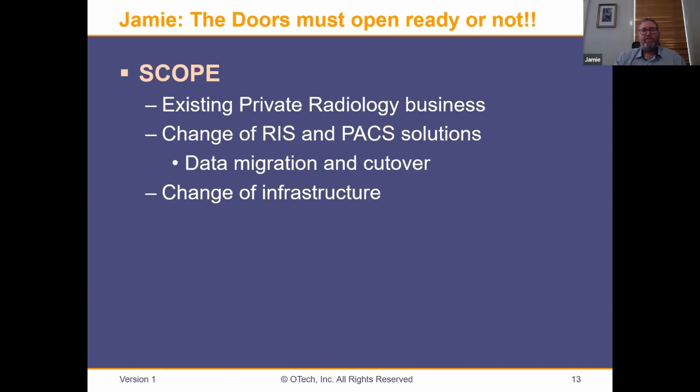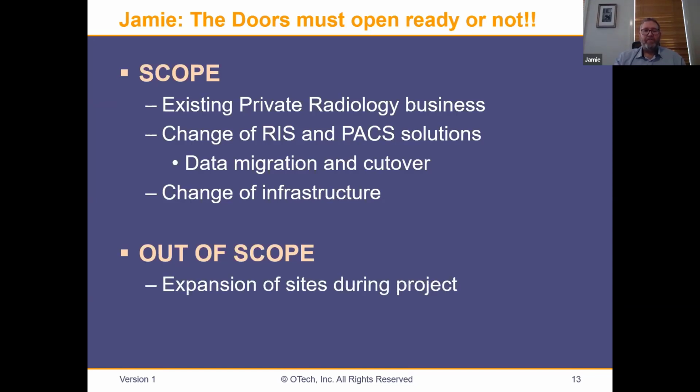When we look at how this scope is, the one thing that came out during the implementation phase, in fact, during the initial implementation planning study, was out of scope work. In particular, the expansion of sites during the project, moving from a single site to a 3-site private practice. Now, that is a big change. That is a massive change for a project manager, and included changing all the WAN and things like that.